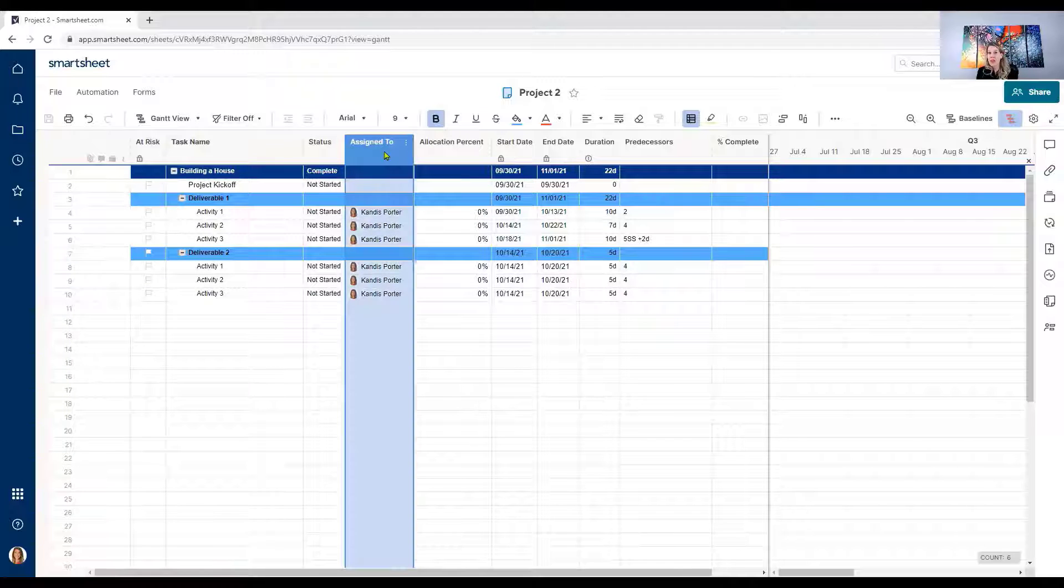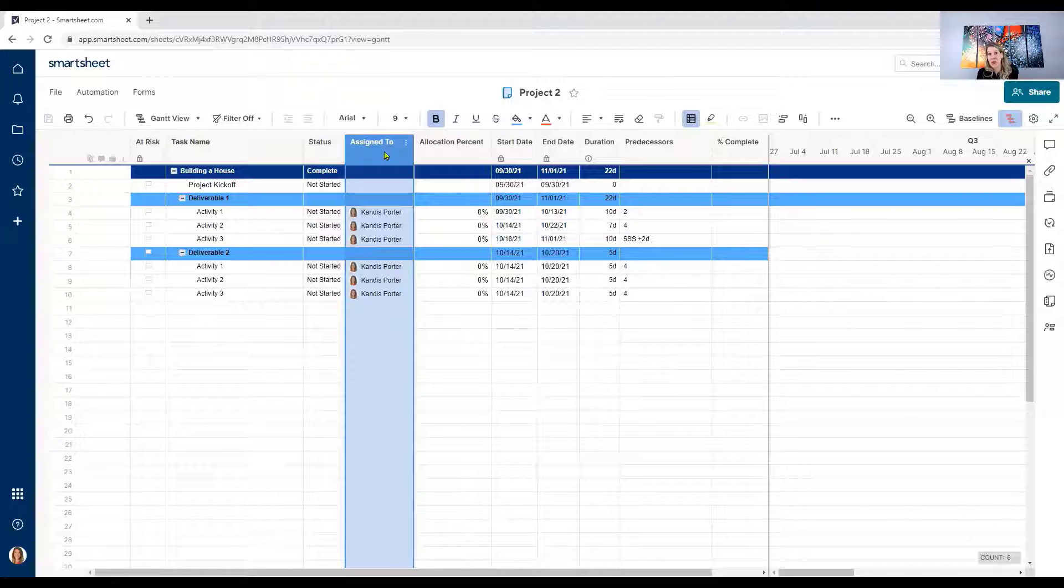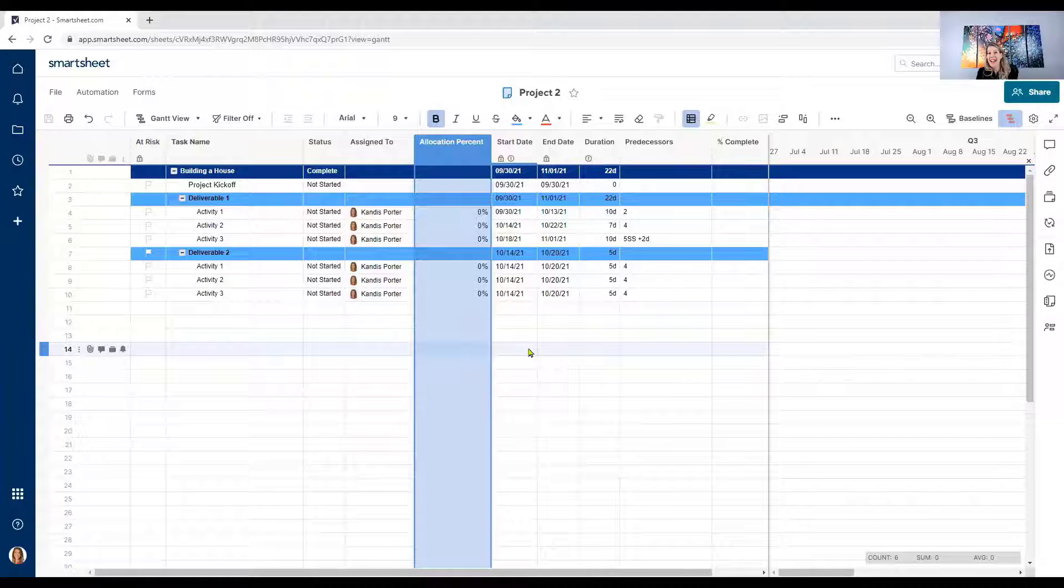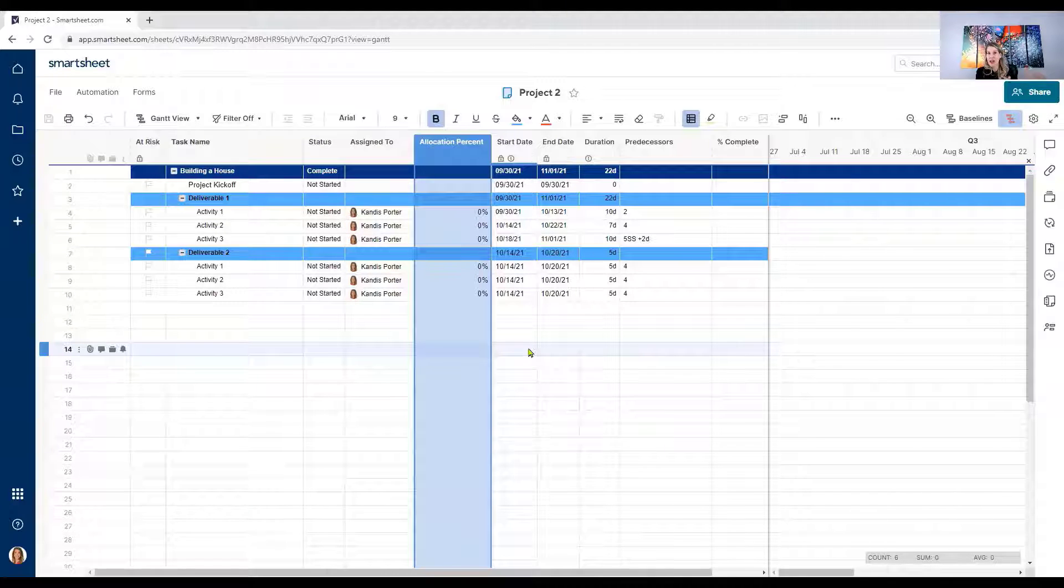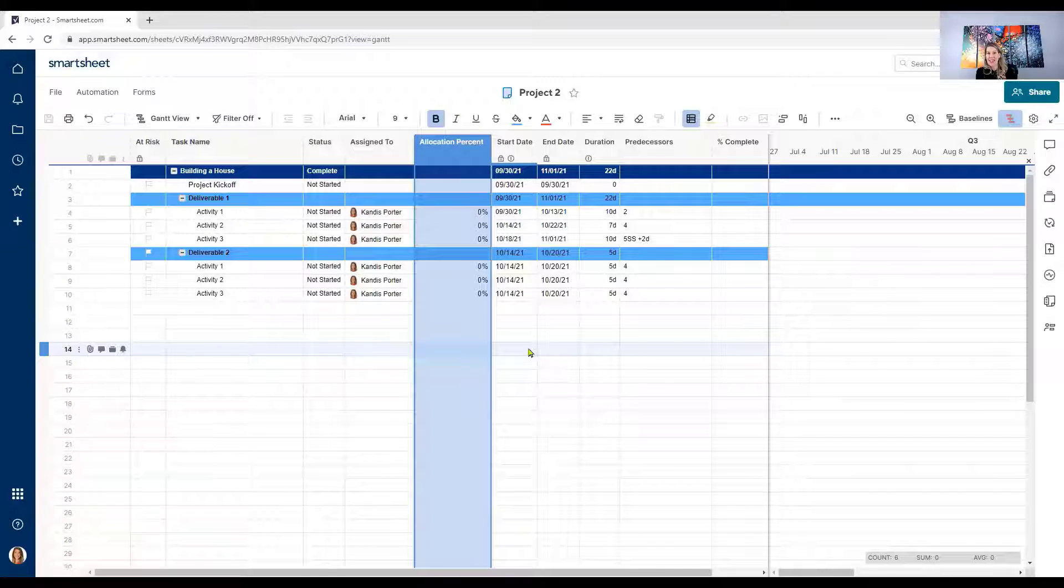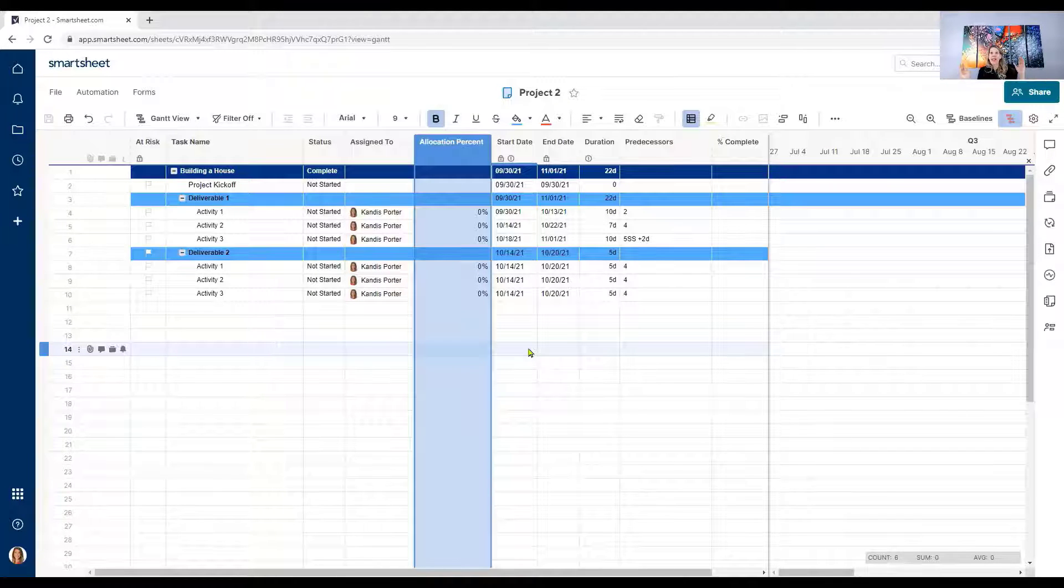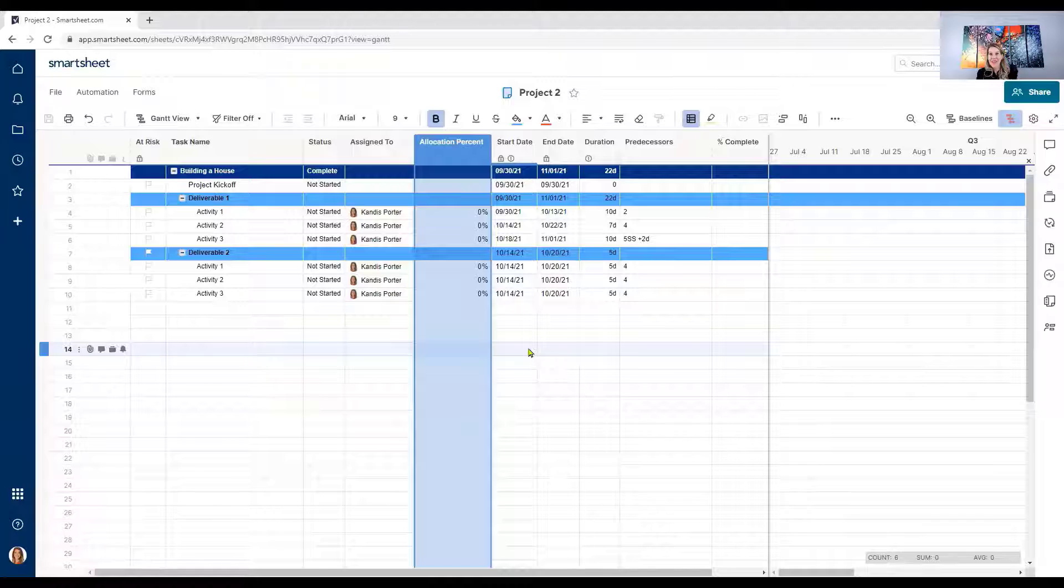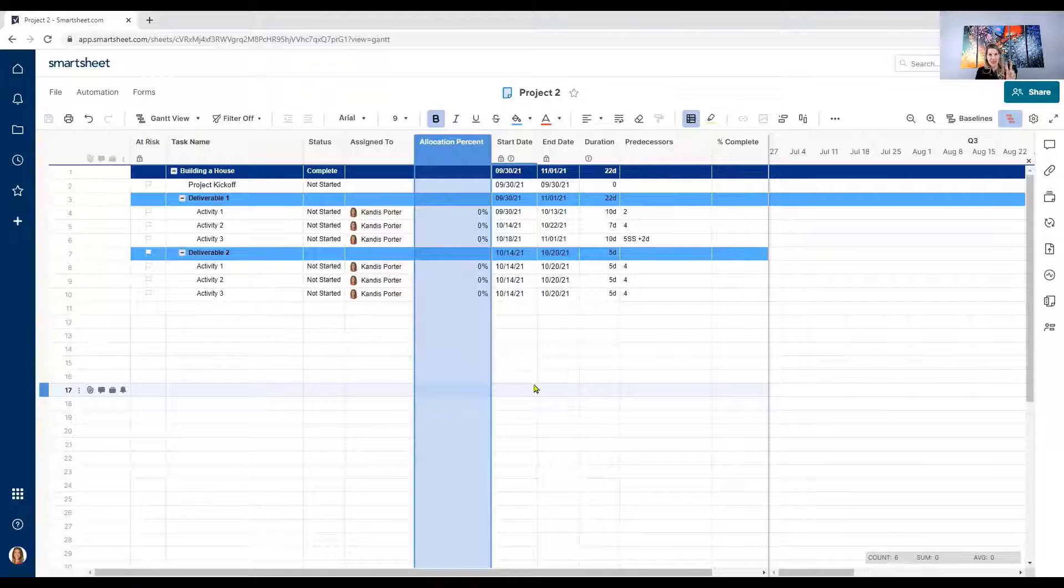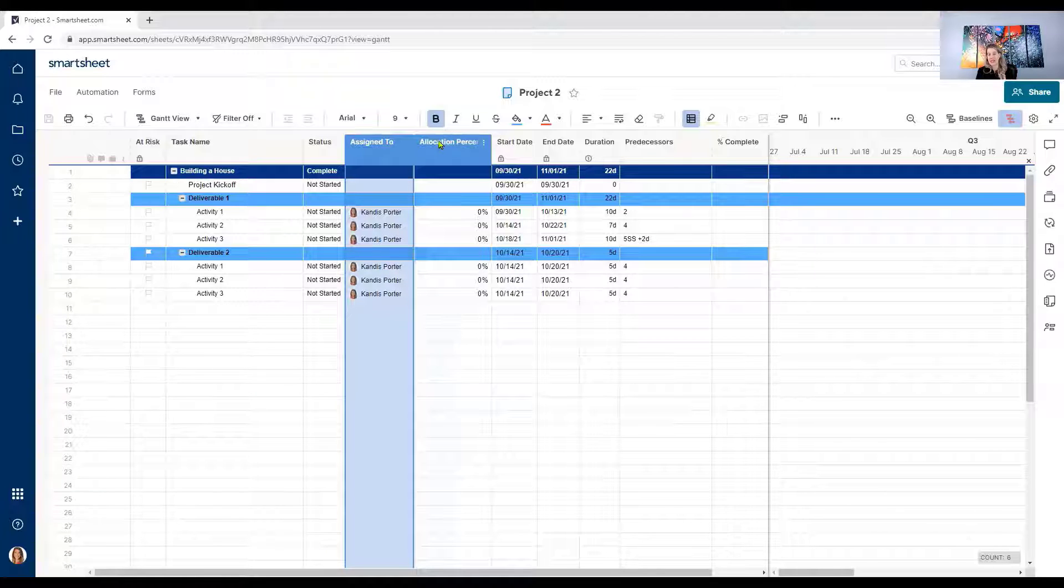It's very important that you have an assigned to column in order to activate your resource allocation. It's also very important that you have an allocation percent column. This is where you're going to say what percentage of Candace's time is being allocated to this project. And this is key. If Candace is working 40 hours in a work week, and she's going to be spending 10 hours on this project, then 25% of her time, so 10 hours out of 40, 25% of her time is going to be allocated to project number two. There's a good chance that Candace is also working on other projects. So maybe she's working another 75% on a separate project. So really good to know. Again, this is going to help you with planning purposes. So two key columns that you need to have: assigned to and allocation percentage.